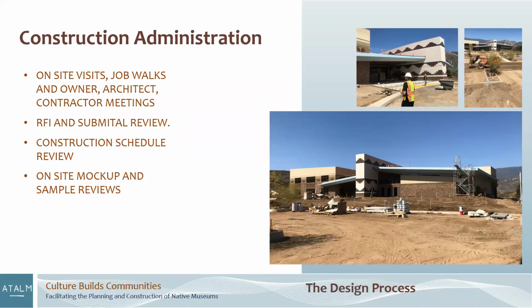And what it does is it gives the contractor a chance to practice and say, is this what you intended? Is this the pattern? Is this the style? Is this the transition? And we can go back to that and say, yes, that's right. And once I sign off on it, the rest of the building is supposed to be at that level, or that quality, or that grade, or I can reject it.